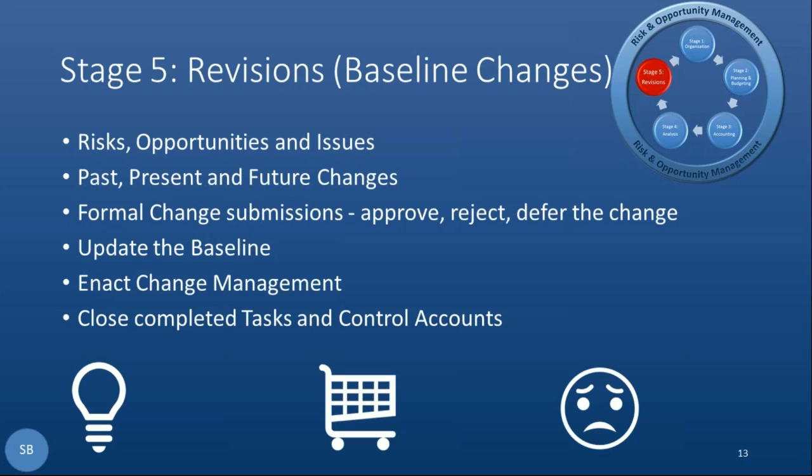If it doesn't, I can then go to my change log and say, is there any change? If I then add change into that, that picture must always equal. So I'll just go back over that again. In actual fact, it's last month's cumulative data plus this month's actuals plus change must equal this month's cumulative data, which is the actual final picture. And that's really, really important, because once again, EV gives you that information. CPR3, for example, is a standardized report that gives you that information.